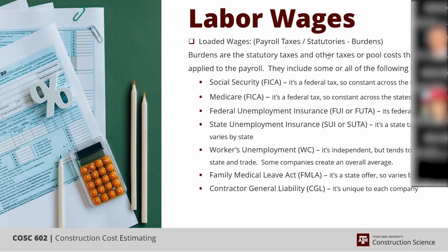And then they laid all risk on the job at the project level, but it didn't include the items covered by the CGL. So the insurance was kind of broken into a personal liability and then a project liability type situation. So it depends on the company how you handle this.